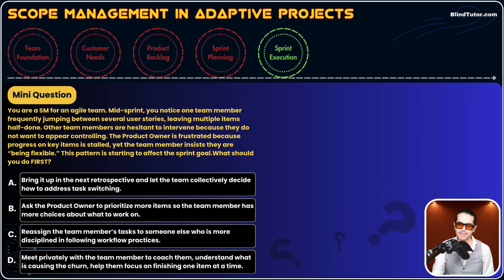No, you meet with that person privately. If it's a group problem, retrospective is a great option. If the churning is for all the group, retrospective is a wonderful option. But since it is just one individual, one team member, meet privately, not retrospective.